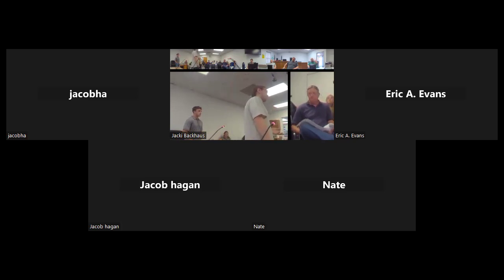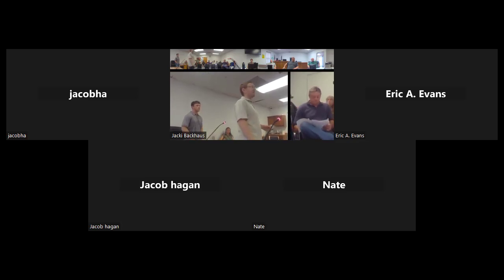Tile, we are boring through the railroad. It'll be a lot quicker to do than waiting for the railroad to build their own bridge. We'll just get the permits and then we'll do the boring. Railroad will have flaggers and people like that they'll require to get on site. But basically that railroad bridge will not affect the tile outlet if the district chooses to go with a tile option.